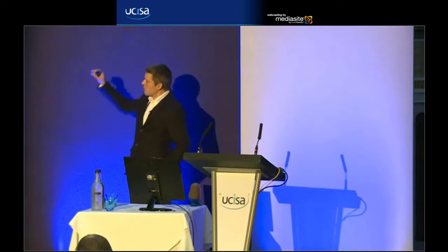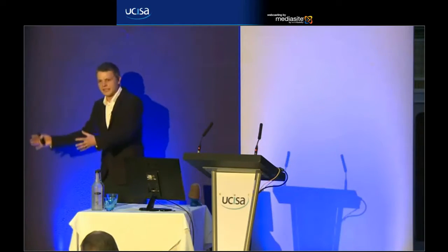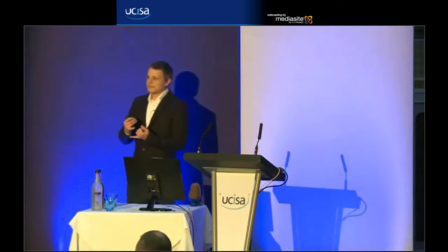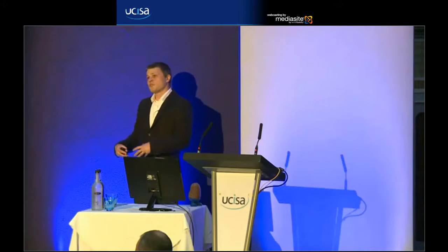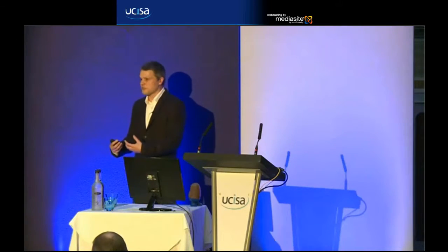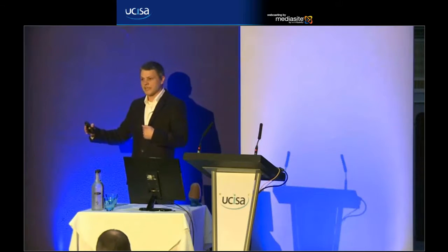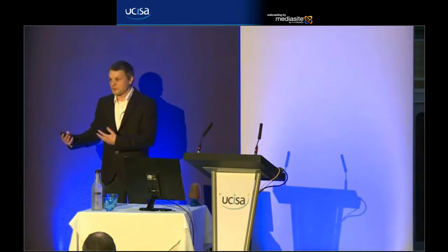And testing is difficult and time-consuming because you've got this big monolithic project where you've done all your development and then you're saying, right, let's get on and test this. There's a lot more to do for testing from the development team, but also your user community, who are often involved in the testing phase, have to commit a lot more resources to it over a period of time, which was often difficult for them because they've obviously got their normal day jobs to do as well.